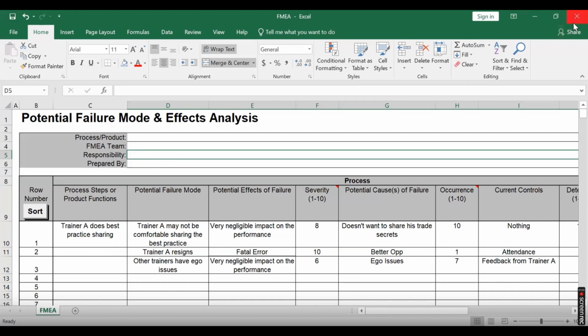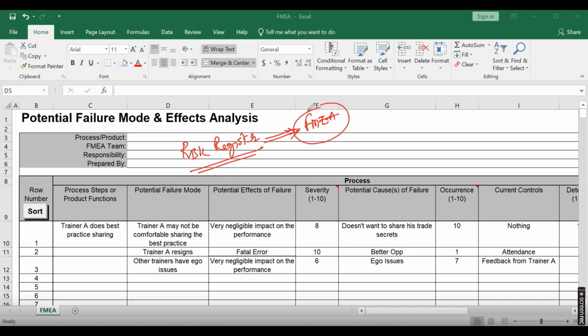We've learned PMP. They talk about a smaller version of this, a very, very small version. In PMP, we also talk about risk management, and in risk management, they talk about a risk register. A risk register is a very simple document, but a much more comprehensive, updated version is your FMEA. The PMP material only talks about the risk register, but I would say the more expanded and more exhaustive version is FMEA. So ideally, we should have FMEA in place.